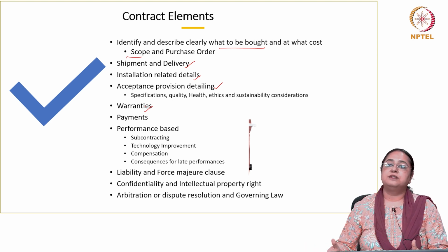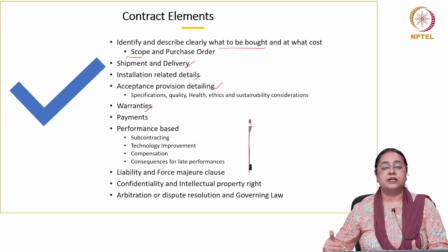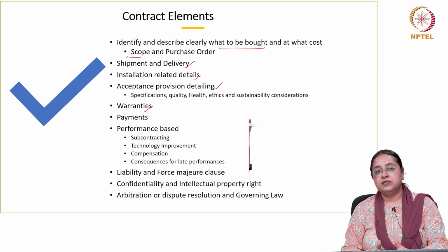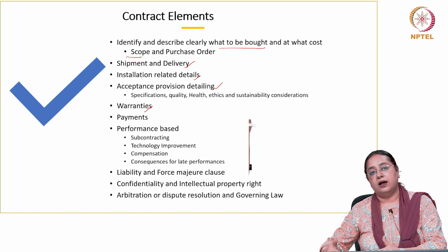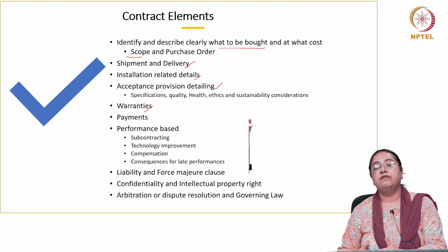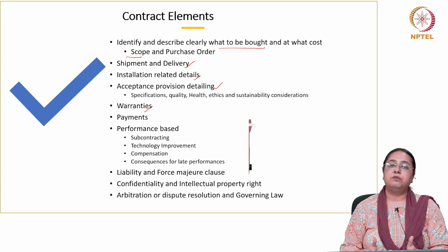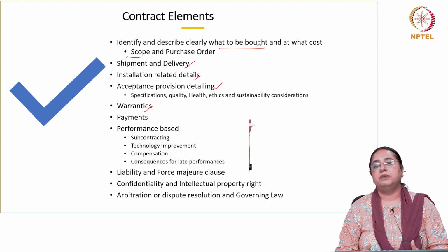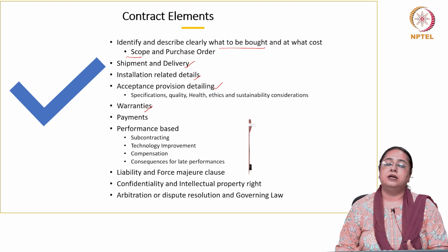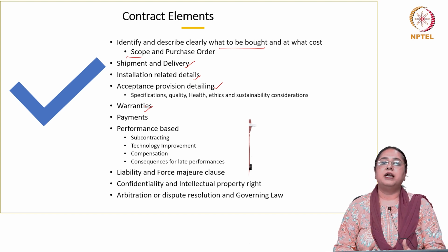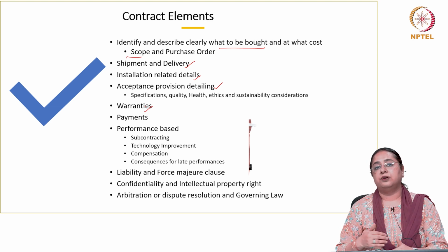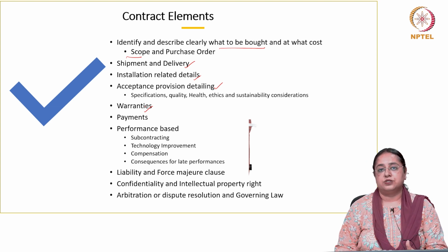Once we receive the product, the buyer can mention that the payment would be done by this mode, and by this date or within this many days. So this is a very important clause. The moment we say payments, the related clause can be how to deal with third party members. Third party members can be the banks or other financial institutions which help in facilitating the transactions. So clear clauses should be there for that also.